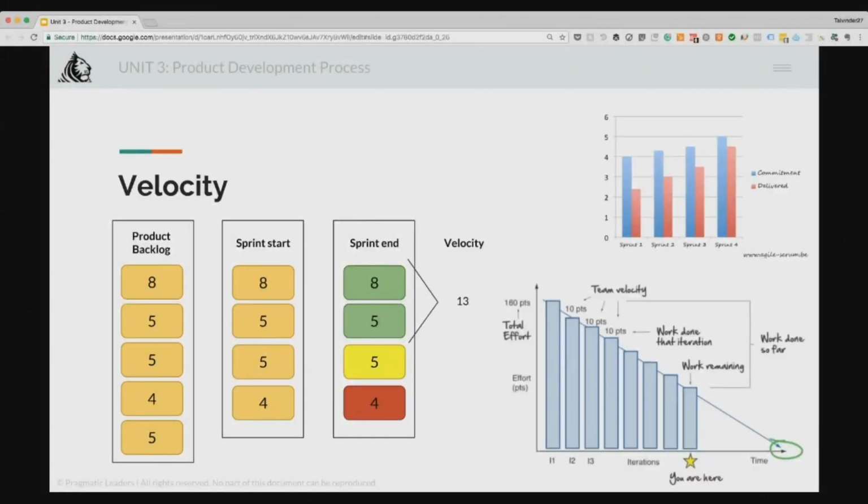Okay? Measure the level of effort and output of work based on each team's unique interpretation of story points. Because when I say something is tough, I would give that a story point of let's say 10, but you might give it 20 or you might give it 30, right? That doesn't mean that you are doing more work. It's just your baseline that you believe that this is way more complex, so I'm going to give it 30. Okay? So it's not an ordinal number, you can say it's a cardinal number. It's a relative number. Okay?